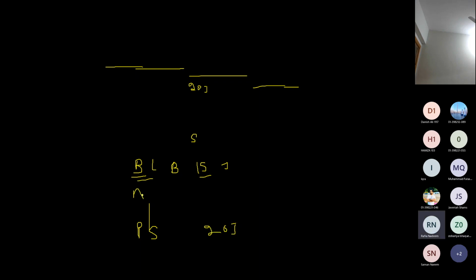And in between was actual. And for activity A, the finish date was 15th of January, but actually it was finished on 20th. So here, if you compare the actual with the baseline, it will tell you your variance. Correct? And that is looking back towards your plan. How much variance has occurred so far?